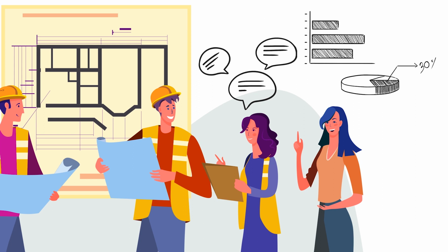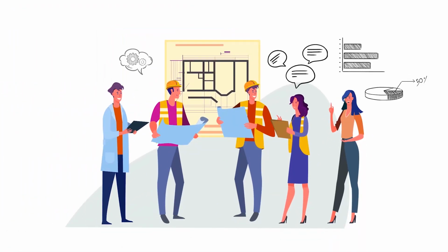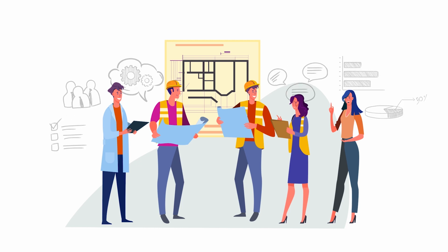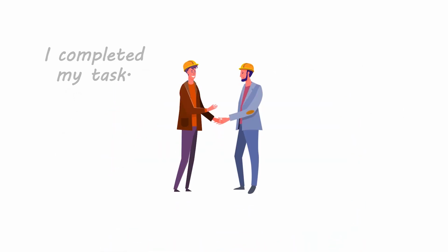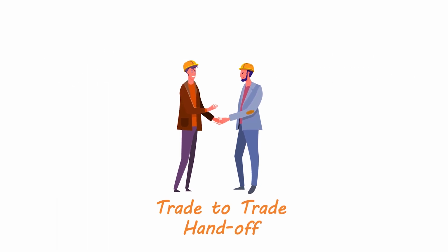Having a weekly work plan highly recognizes the interdependence between the works of various trades, where coordination is essential. And every trade-to-trade handoff should serve as part of the work's quality control, keeping everybody accountable to their work and their schedule.